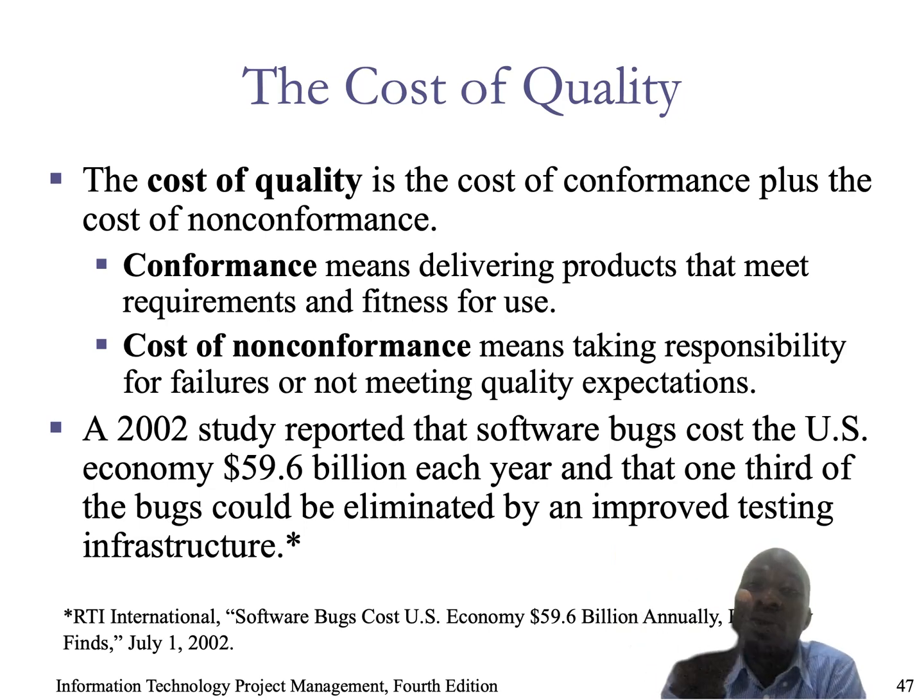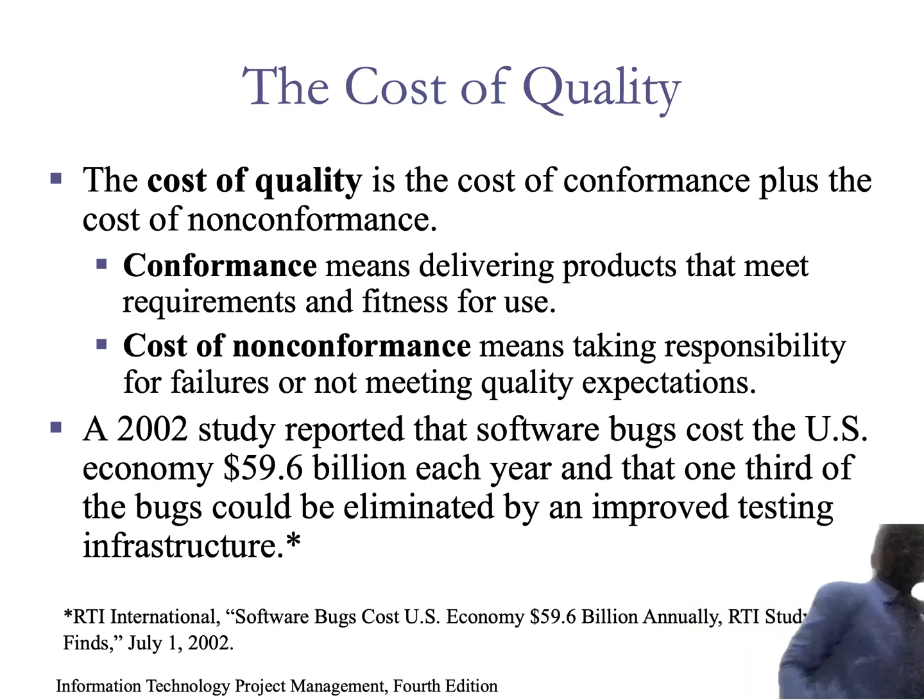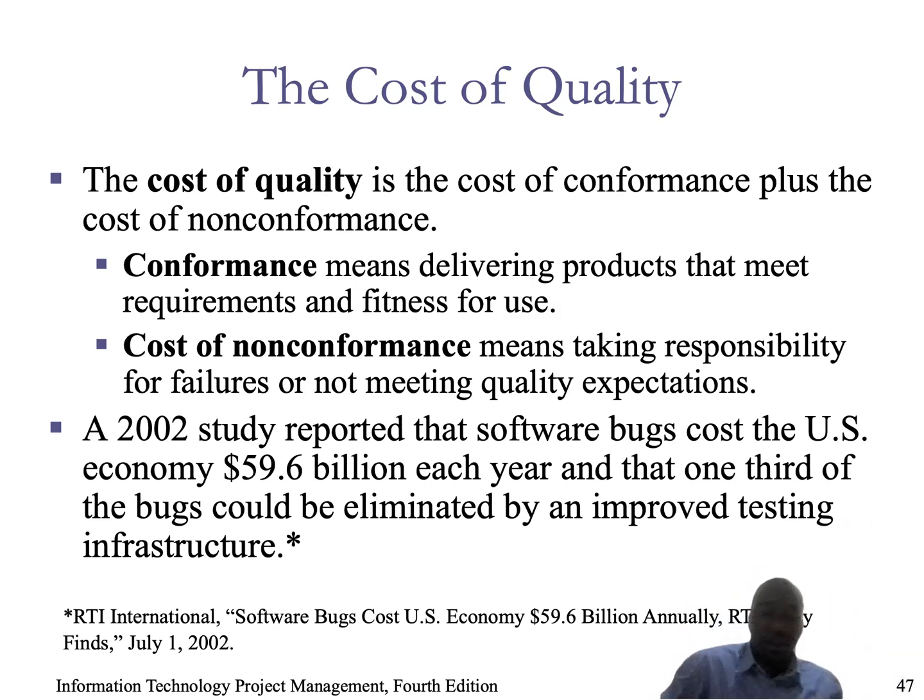That means it has to be deducted, because you are trying to see the cost of quality. So it is the cost of conformance plus the cost of non-conformance: how much it has cost you to achieve the requirements, as well as the failures that have happened in that matter.